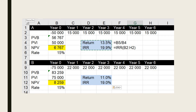In theory, we really should choose B. Although we have invested more money into project B, we haven't ignored that fact in doing the calculations — we've taken into account the bigger investment and it's still giving us a bigger NPV. What worries people is where would you get the extra money. If you only need 50,000 for A, how are you going to get the extra 25,000? Well, if these projects are delivering a good return, which they are, you should get this money. It shouldn't be a problem in theory.